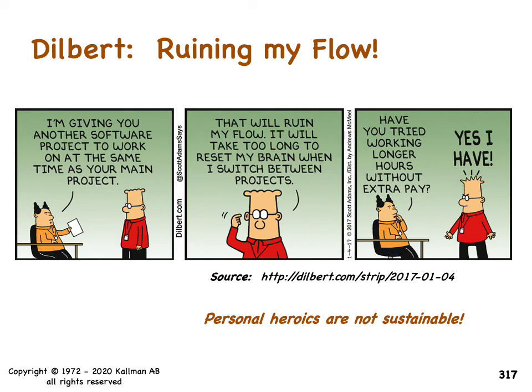And there's a couple beautiful things in this picture. First, personal heroics are not sustainable. If you are working 60 to 80 hours a week, or even over 50 hours a week, the studies have already shown that your quality will be going down dramatically.